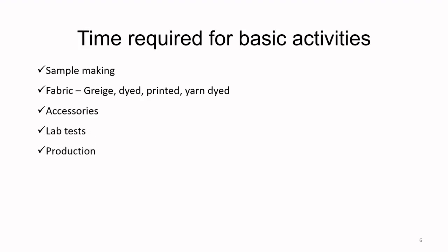And production depends on what the garment is, how complex it is, how many machines you have, and therefore in how many days you will be able to complete the production. And finishing, again, depends on how many people you have, how many washing machines you have, what is the current load, and how much available capacity you have, and based on that you can ascertain the time required to complete the finishing.